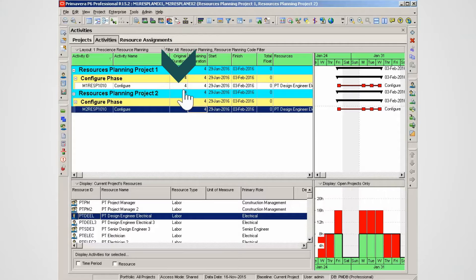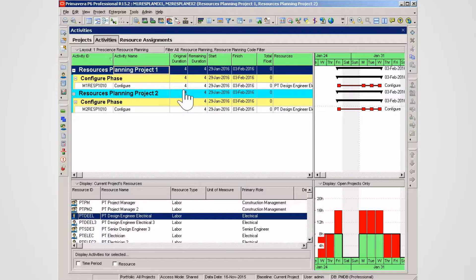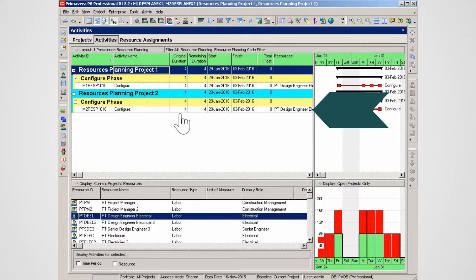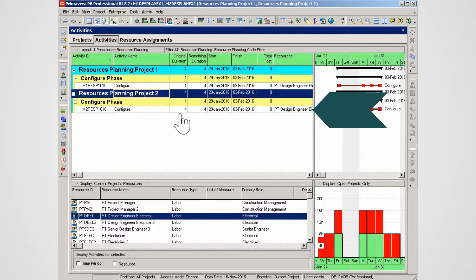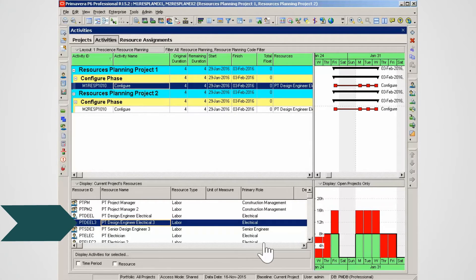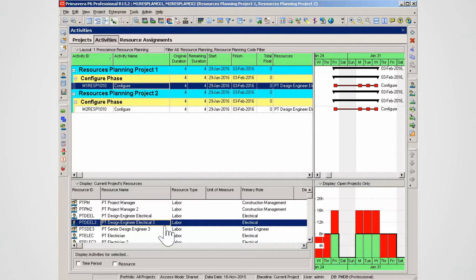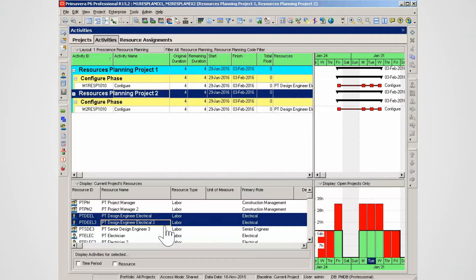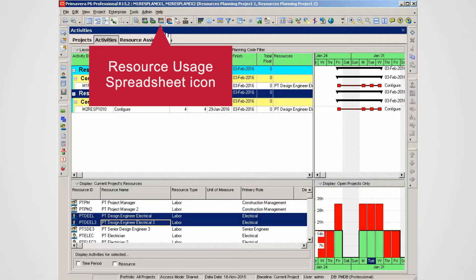Project one's configure activity has a design engineer electrical assigned. Project two also has the same design electrical engineer assigned during the same time period. Resource PT Deal is over-allocated, being assigned to work on two different projects concurrently — a total of 16 hours a day. Resource PT Deal 3 is also over-allocated by eight hours a day with concurrent assignments. Looking at both resources, you can see the total over-allocations.